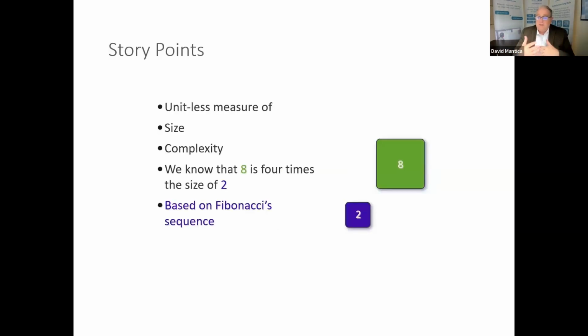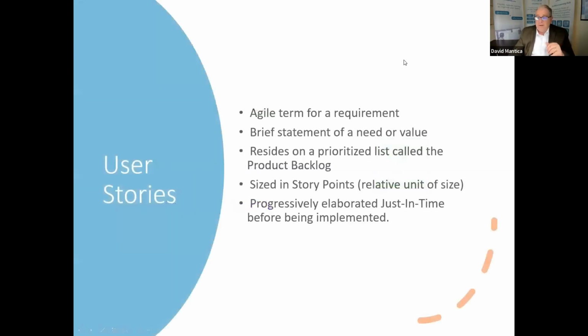And that's where you'll see this idea of story points. So now it's level of effort. The story points are based on the Fibonacci sequence, so they're trying to do it from a non-hour-related mindset, and you're ultimately looking at levels of effort. When you get into the Fibonacci sequence and go into the hundreds, Agilists like to see if you can break that down, because if it takes that much level of effort to do that user story, then that user story needs to be chunked up more because you're missing things. There might be something in there that we need to know about that you're not telling us. So you want to keep your story points in a tight range, and you're looking at level of effort. And planning poker is a game that you play in an Agile class around doing that better.